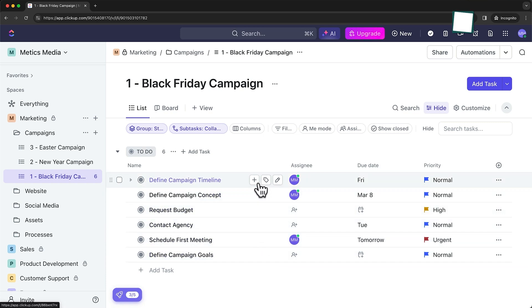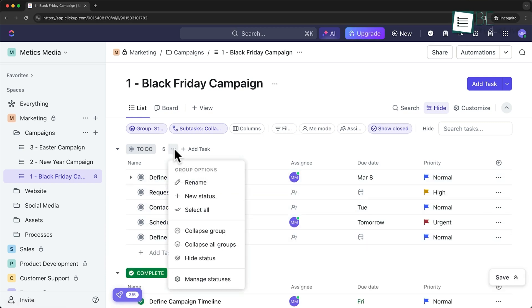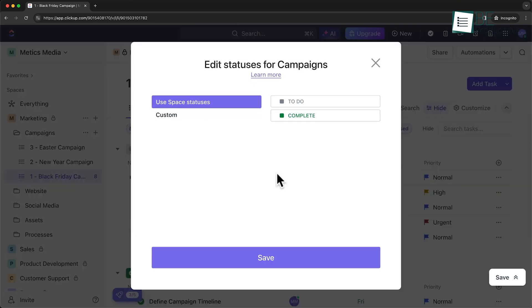For example, we noticed that one of our developers had several large tasks all due around the same time, which helped us redistribute some of that work before it became a problem.